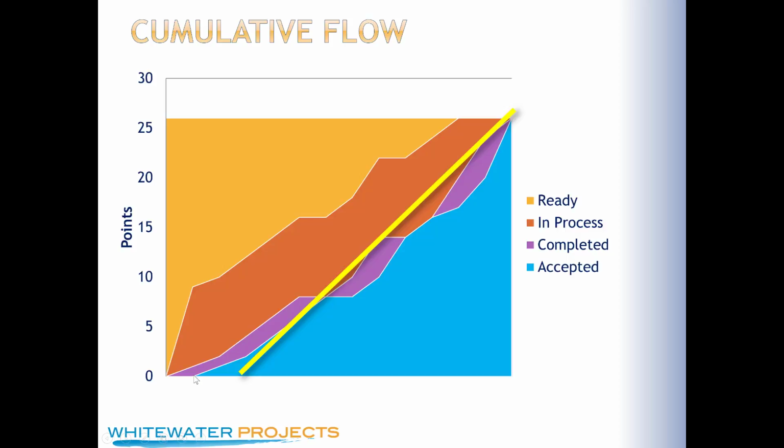So the work got through to done, but the product owner did not show up. They didn't have a chance. I don't know, maybe they were traveling, or they didn't agree that it was actually done, right? Didn't agree it was actually completed. So at that point, there were 0 points that were given to this team.